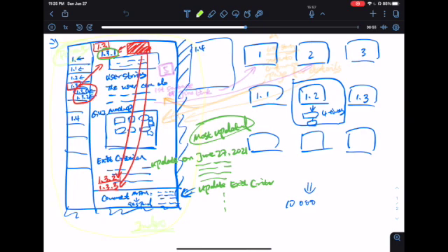And then how do we link it to Jira? Just now I mentioned that we use Jira as a ticketing system. What that means is we use it to assign the tasks to the developers. So for example, this user story 1.3.1, it depends on how you break it down. It can be broken down into maybe 5 different Jiras. I mean, it really depends on the size, how you guys do it. There's no right answer to all, right? So let's say this one is split into 5 Jiras.